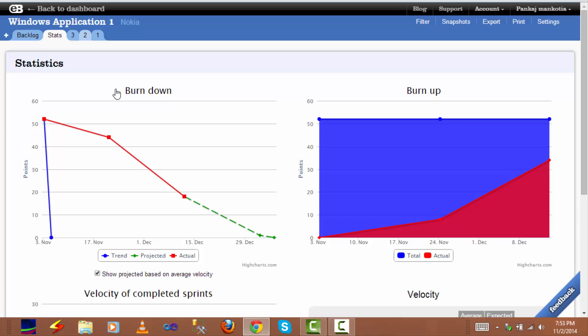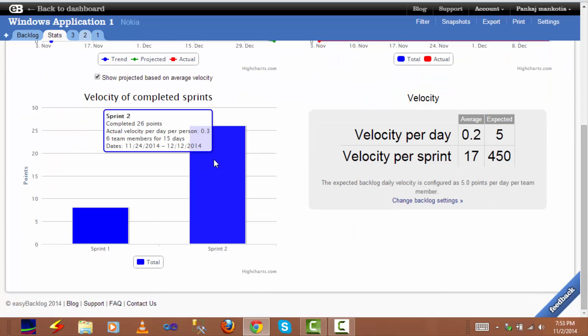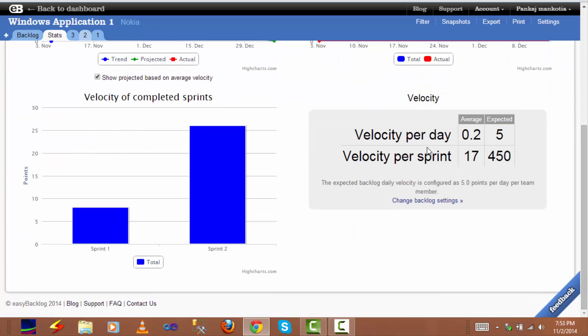The burn up chart shows how many points in total we have in our backlog at the start and end of each sprint using blue, and shows our progress in completing stories and their points for each sprint. The completed sprint chart shows our velocity or points completed for each completed sprint.